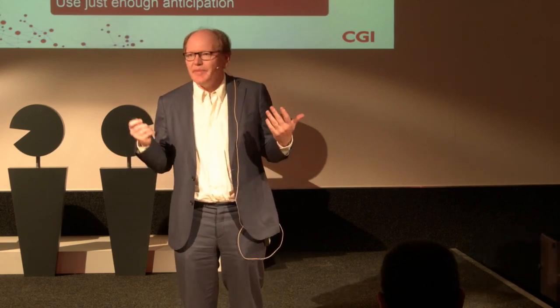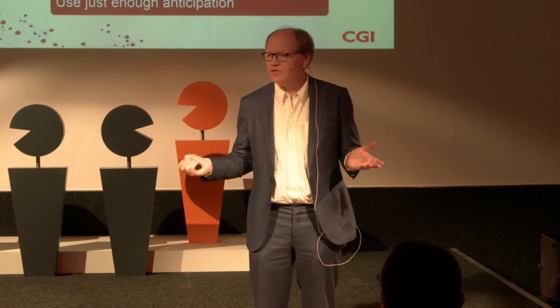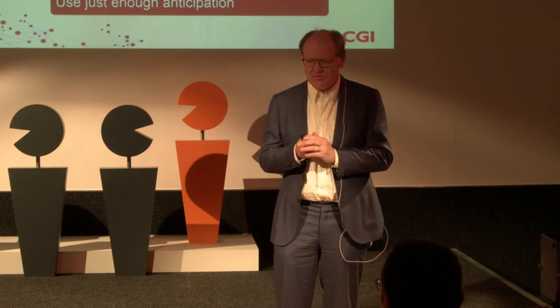So keep a backlog of architectural concerns, those are the decisions that you have to make, prioritize them by risk and cost impact, and then create an architecture that is as small as possible. Because, and this is a principle that many architects don't like, because of course, the bigger the things you make, the more important you are, right? So some architects sort of resist this principle, but it's actually the case that architecture